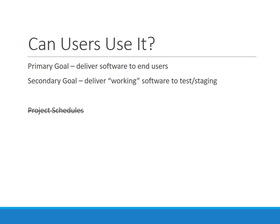So what really defines success? Can users use it? Project schedules really aren't the way to measure success — checking off tasks, milestones, and activities off your project schedule means nothing to an end user. What do they want? They want to be able to touch it, feel it, use it, experience it. Your primary goal is to deliver software to end users. If for some reason you can't do that as early as you'd like, the secondary goal would be to deliver working software to some test or staging environment, where at least internal stakeholders can touch it, use it, and experience it, and provide some feedback until you're ready to move to production. The end result: can users use it? Lead time and cycle times are probably your best way to measure that success.